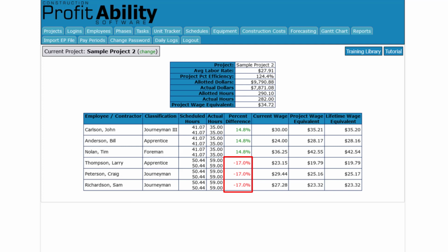These workers didn't make their commitment on their tasks on this project, and we ought to fire them, right? Wrong. Once you put tasks with time limits in front of workers, something really mysterious is going to happen. Things are just going to start getting done on time. If they don't, one of two issues will be going on. Either they encountered an obstacle that was not foreseen in the estimate, or they need training on a certain type